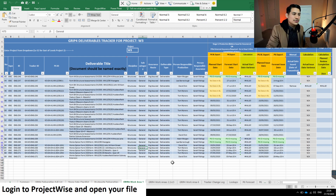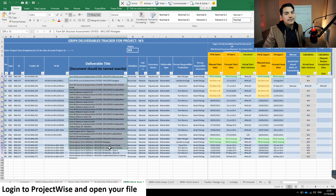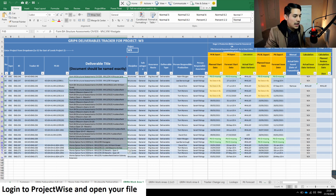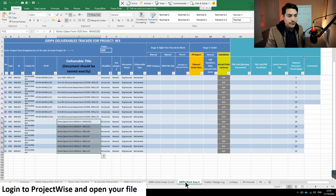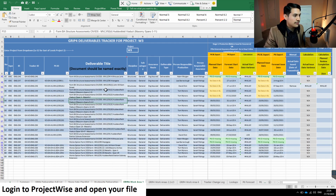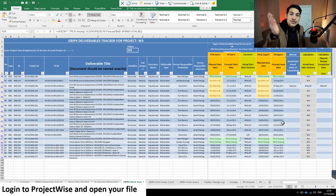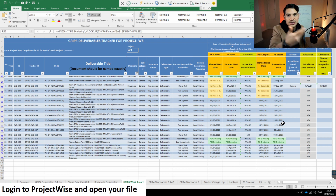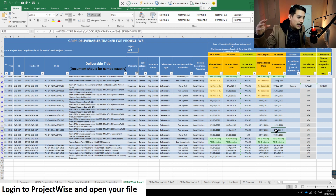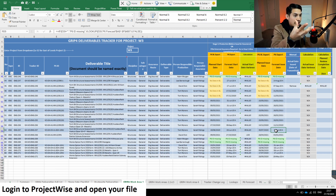This Excel spreadsheet is a deliverable tracker for my project. I find all the documentation I need to submit as part of my stage gate process, split up into different work areas — work area one, work area six, and so on. For each work area I have a list of documents, drawings, reports, and assessments, along with all the forecast issue dates and forecast start dates, which come out of P6 via a formula connection between P6 and my Excel spreadsheet.